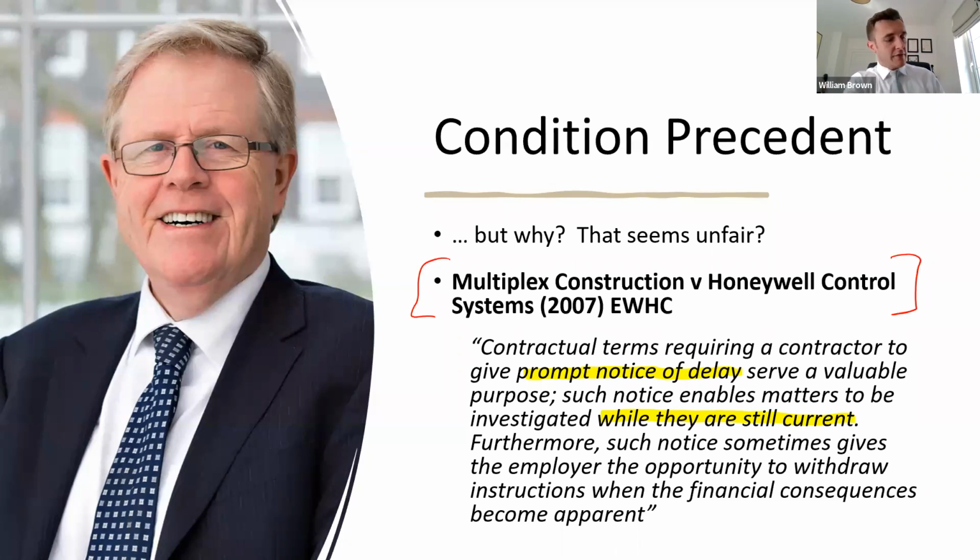Put it like this: if you are constructing a garage and you're paying the builder to construct it for you, and they start to put in the foundations and they uncover a problem, you want to know about it as early as possible so that you can make an informed decision about what to do next. You might decide not to go ahead with the garage. You might decide to change the design, to make a feature out of the thing that you have found. There are lots of different options, and that is the point behind these condition precedents, and a notice condition precedent anyway. So don't look at it from the one-sided perspective that it is unfair. Look at it from the broader perspective of both parties.